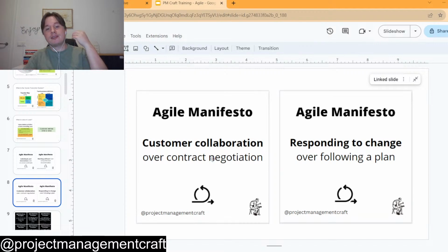So you can deliver value to them, and focus on delivering value instead of focusing on the contract negotiation. And again, the contract negotiation is not unimportant. To make sure that Agile works, one of the constraints that you need to have is the right type of contract, because a fixed price contract in an agile environment will be very tough to keep. But that's something to keep in mind.